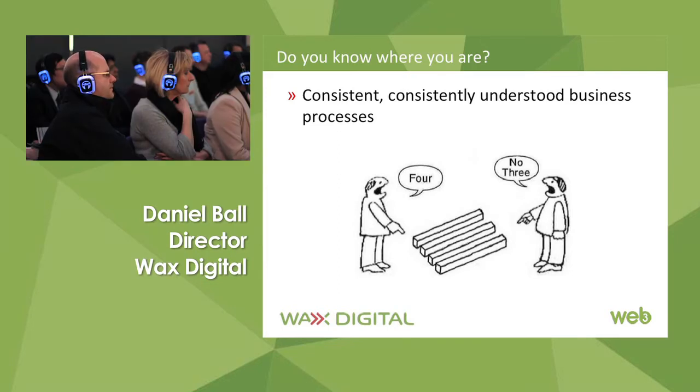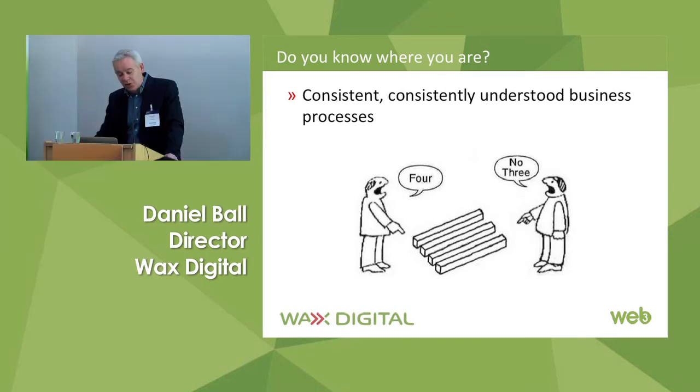And moreover, those two sides of the business both believe that they're doing it correctly in the right way. So do take the time to discuss, to agree, to document your as-is process, and you'll save a lot of time and energy and cost ironing out those differences before you start, rather than subsequently trying to engineer a solution to accommodate them.